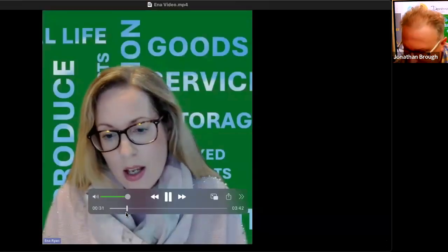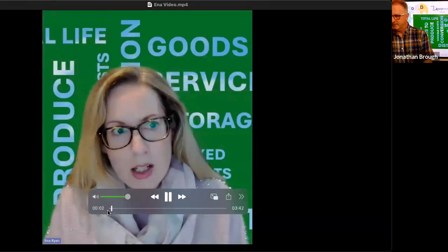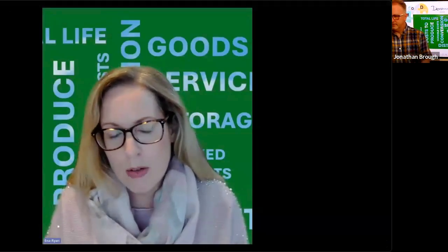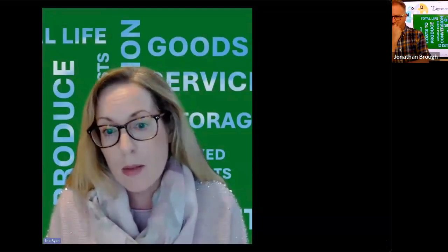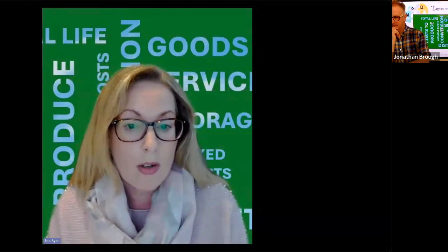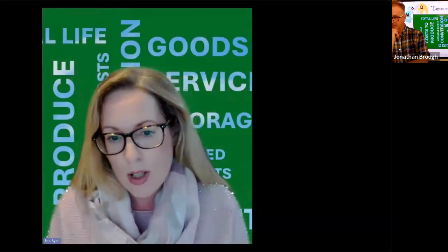Product or service. And we're looking for a new supplier, regardless whether we're doing a large complex RFP or it's a simple new requirement. We always start off actually with the statement of requirements or the technical specification, and that's agreed with the stakeholders. And the next thing we do is then we agree the selection criteria. So how are we going to evaluate the proposals we get back? We agree then if we weight the criteria, because some are more important than others, and then we also agree on the scoring, how we're going to score them.